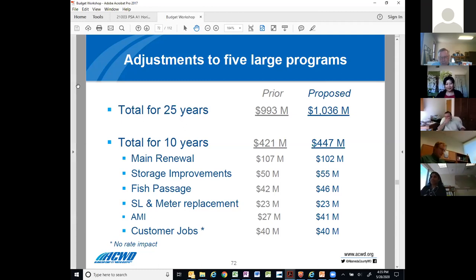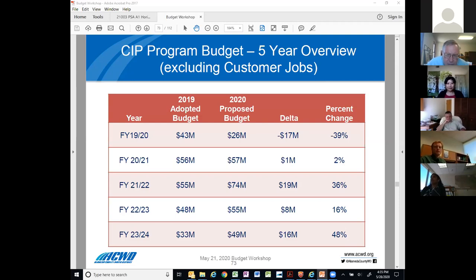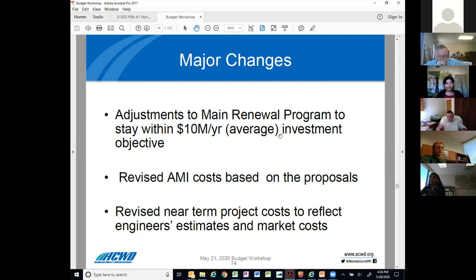If there are no additional questions, I'll move on to the next slide. This is another snapshot of our CIP budget looking at our five-year overview and drilling down to what we're going to see in the next five years. This includes only the general fund portion of the budget, including FIF and FRF, but excludes customer jobs. The effort stayed the same in terms of the number of projects and related scope. One reason for the change in budget numbers is a shift in milestones — the underspending or savings from prior years are shifted into future years, hence the increase in budget for future years. There were also some changes to cost estimates to reflect true costs and market changes.